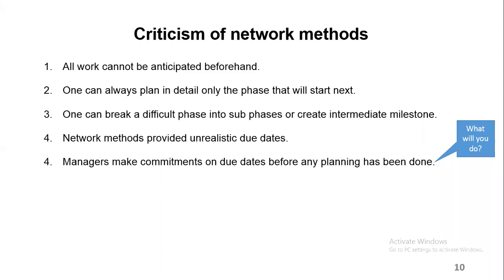Normally, what they do is write a note for the record to protect yourself. You need to protect yourself. You write a note for the record that I recommend we postpone and do this in 6 weeks because of this and this and this. You send it to him, like an email, and if anything comes up, I have that email to prove it. Because sometimes it can get worse, like, no, just finish it, you don't seem to be competent enough anymore, Thomas. But you'll be like, no, I told you these are the risks involved. Because sometimes those guys try to force things, but things don't work like that.